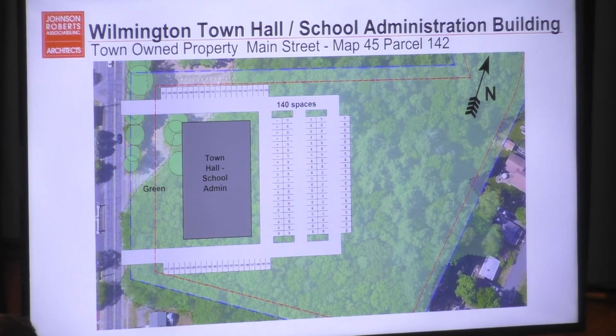So it looks like it would support the building, and it looks like there's enough green space there that we could do things like regrade it in order to get the parking lot and everything in. We'd have to take some of those woods down in order to do things like stormwater management and just get the thing built. So it wouldn't look all green the way it does right now. We take down a lot of those trees.